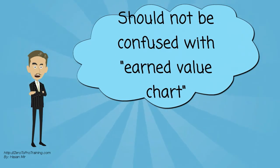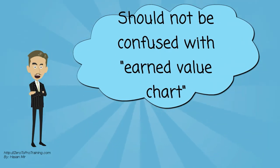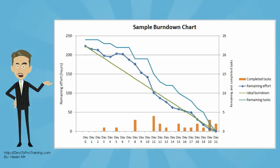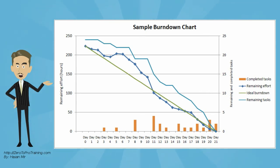The Sprint Burndown Chart should not be confused with an Earned Value Chart. Here is a sample Burndown Chart for a completed iteration, showing remaining effort and tasks for each of the 21 work days of the 1-month iteration.